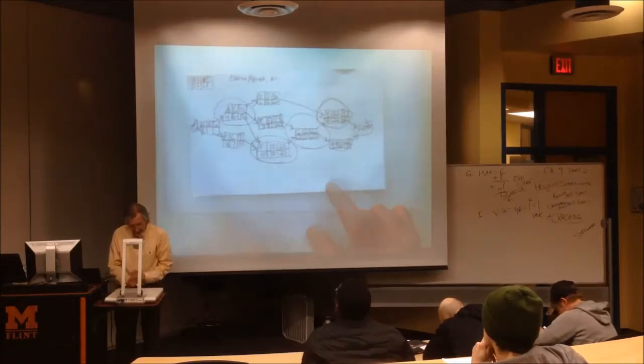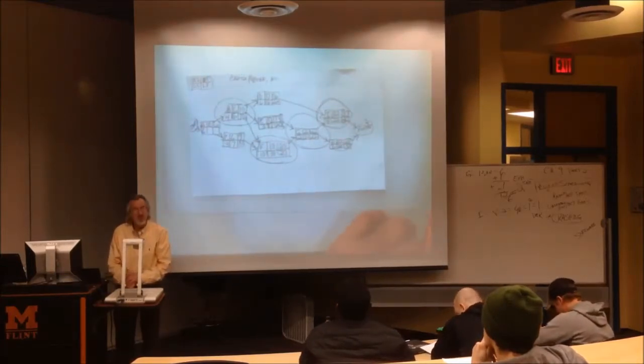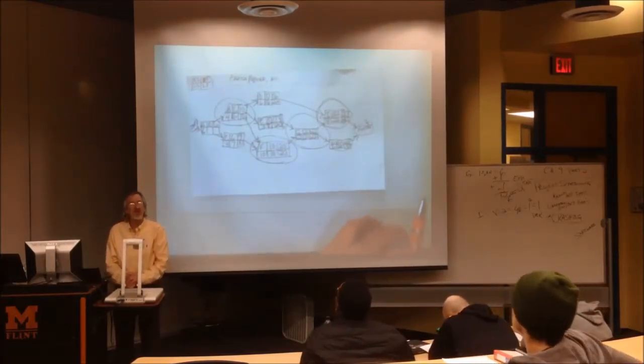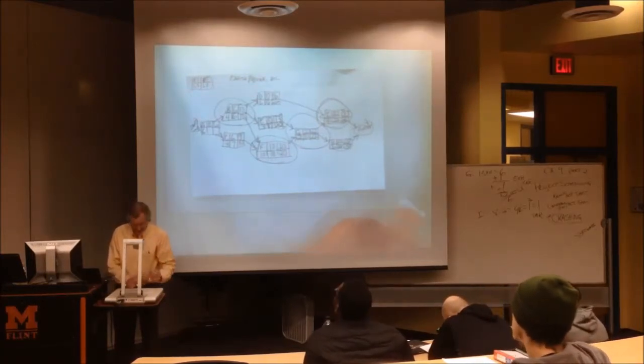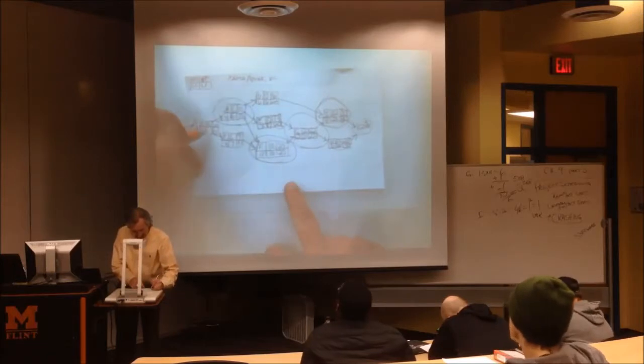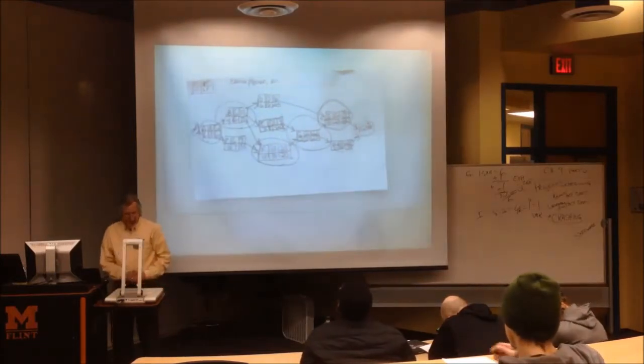Not critical. Here we go with A. Your choice is between what two numbers before you tell me what the latest finish is? 6 and 7. So you're going to go with which one? 6. Subtract 6, you get 0. We just found our critical path.